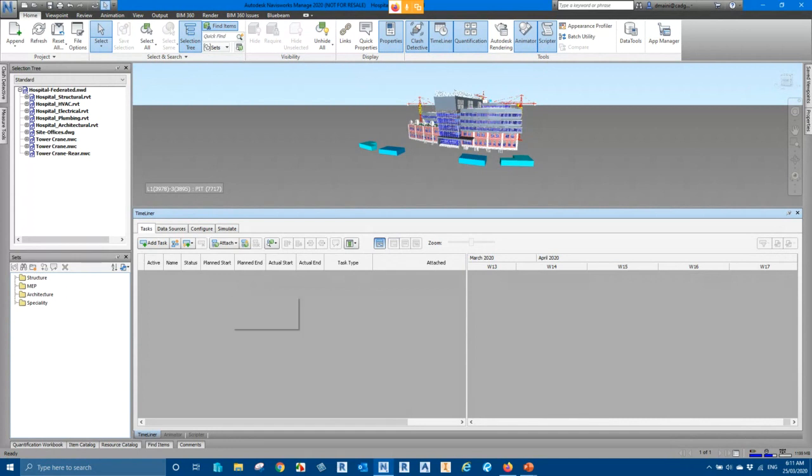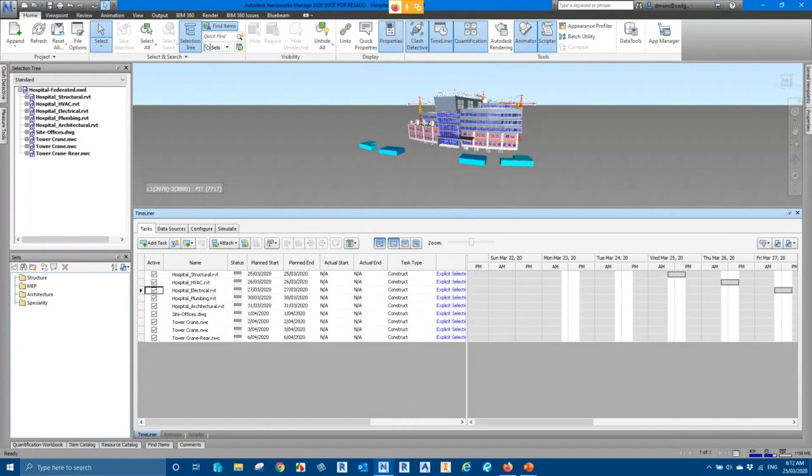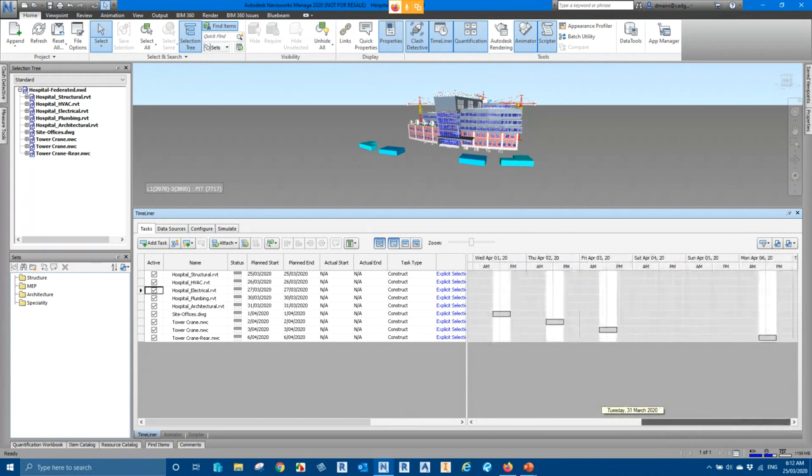So if I show you an example of that, I can right click here and I can go and say auto add task for every topmost item. So as you could see, it creates a single task for each of these items. It starts from today's date, gives each task a 1-day schedule, and then shows you the animation. I've got my Gantt chart here that I could see.